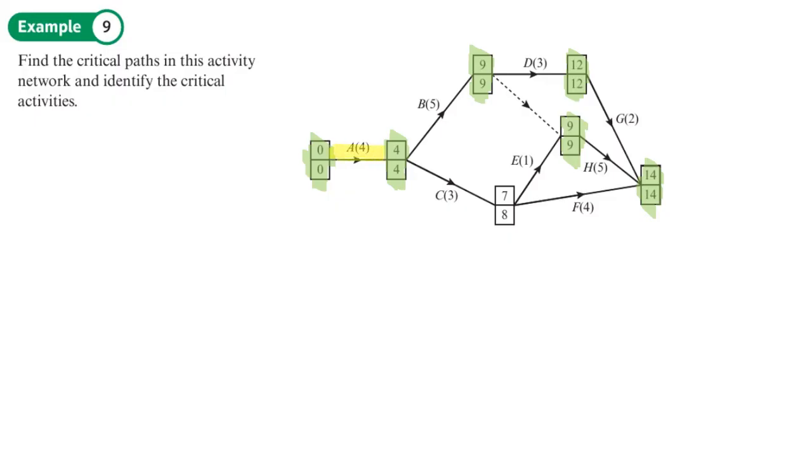So the difference between 0 and 4 is 4. The difference between four and nine is five, so that's critical. The difference between nine and 12 is three. Now here we've got a dummy activity, so that's zero. So that's part of the critical path. Then over here, the difference between 12 and 14 is two, so that's part of it as well. And then nine plus five is 14, so that's part of it as well.